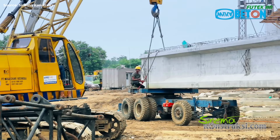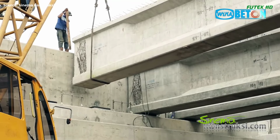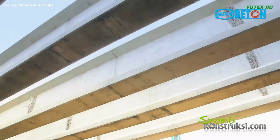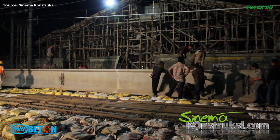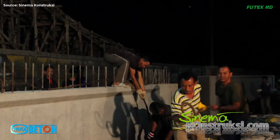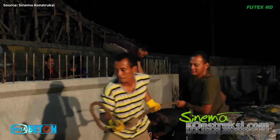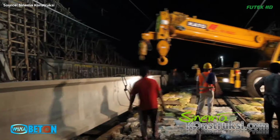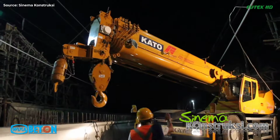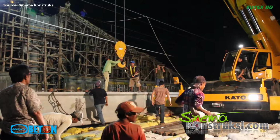Funding and financial management. Securing funding for such a large-scale project was another challenge. The project, owned by a joint venture company PT Lintas Marga Sadaya, required substantial financial commitments. With 55% ownership by Plus Expressways Berhad and 45% by PT Bhaskara Utama, the project managed to secure a Rp 9 trillion bank loan commitment, which could only be withdrawn after full land acquisition. The efficiency of precast concrete beam installation played a role in convincing financiers of the project's feasibility and adherence to timelines.